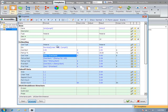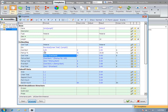What we've learned here is that you can just create a new item, set the type, enter in any variable information that you want to put into your calculation, build your quantity, whatever formulation it is to quantify the item you're creating, add the cost each, and the markup percentage. Everything else is taken care of.